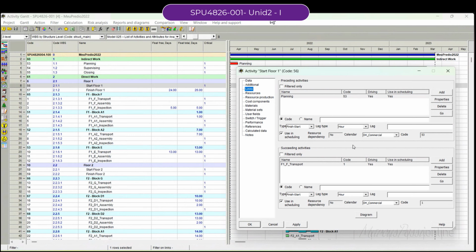Oh, okay. So for example, I can have painting activities with one calendar, the commercial days. Let's say they work from Monday to Friday. They don't work Saturday and Sunday. Then the next team after the painting, they work also Saturday and Sunday. But if I apply to painting a 2 days lag for the next activity, and I include the calendar, like for example, 24/7, the other team, even if they work Saturday and Sunday, will need to wait Saturday and Sunday and work until Monday.